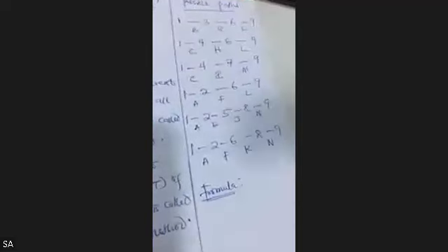After you have gotten these possible paths, formula. Let's go to the formula. I want to break this thing down so that you understand it. What is the formula? We first look at the earliest start time, ES. The formula is the maximum value over I of ES I plus D I J.